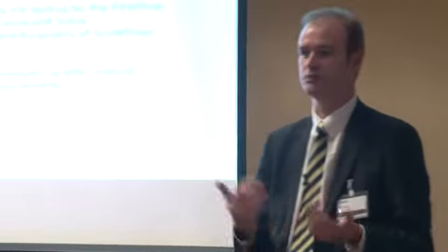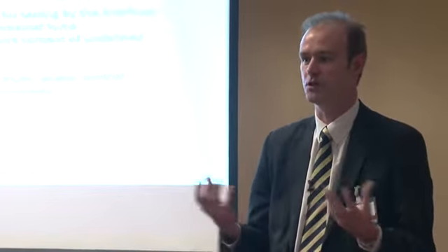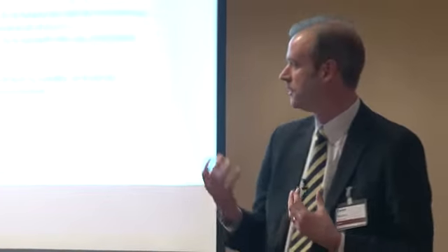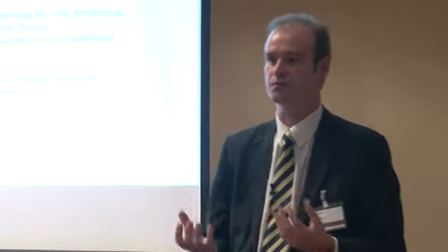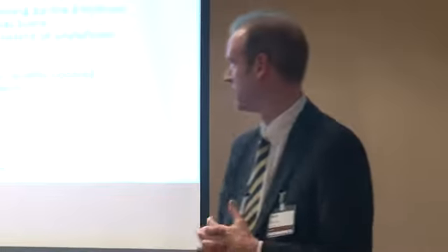And I also like to build in codes or intelligence into your programmes, where you can allocate codes to particular activities if they are in particular sections of your project. You can allocate different cost codes with whether they, I don't know, particularly concrete gangs or earthworks, etc. If you build in these codes, you can start to filter your programmes, review them and analyse them in far greater detail.